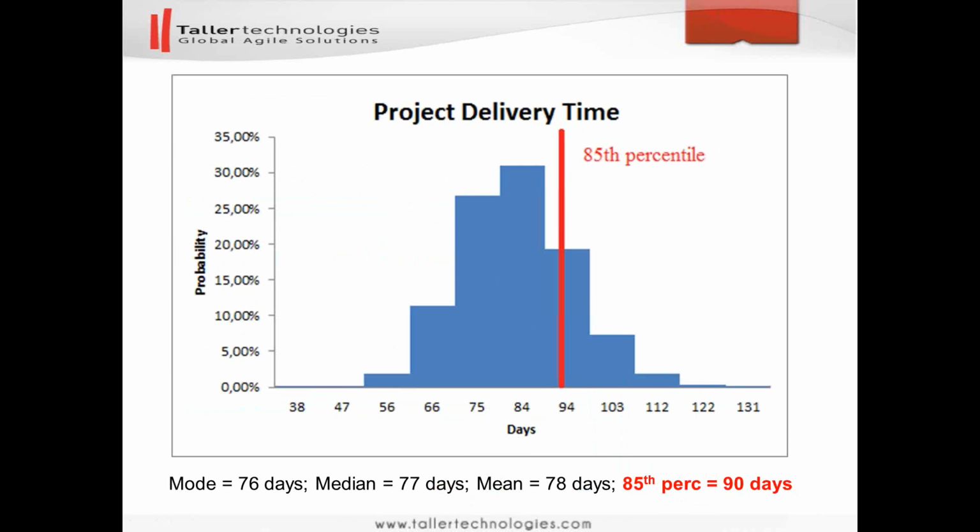And the third leg is the number of defects that the team expects to have, or last-minute changes that the team expects to come from the client. The number of defects should be part of the historical data for a sound development organization. And I believe a tool such as SwiftKanban can provide you with such data automatically.